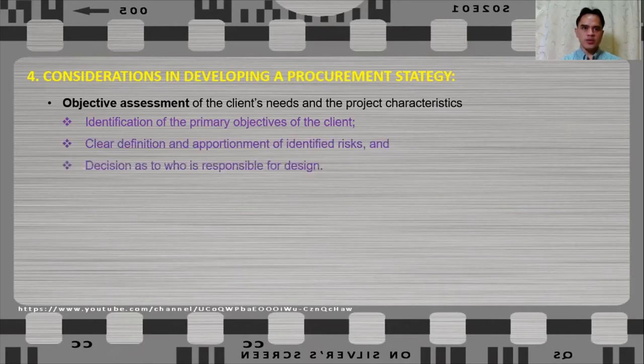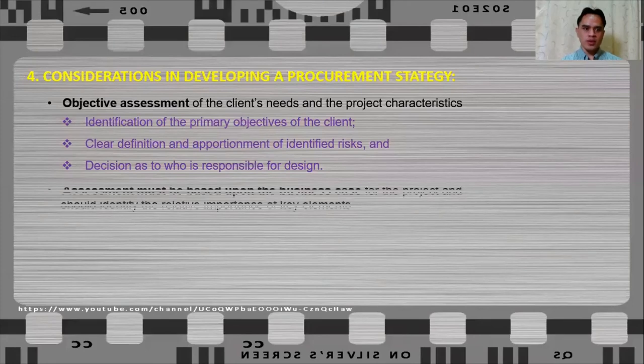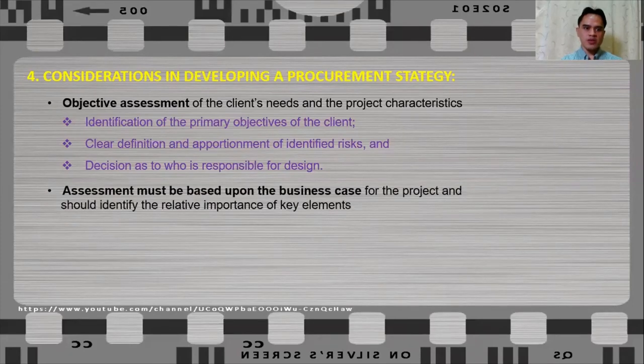Another important factor to consider is who will bear the design responsibility as this will greatly influence the selection of your procurement route. Next is that the assessment of these objectives must be based upon the business case for the project and should identify the relative importance of key elements. And these key elements again are the performance or quality, price, and time or schedule.